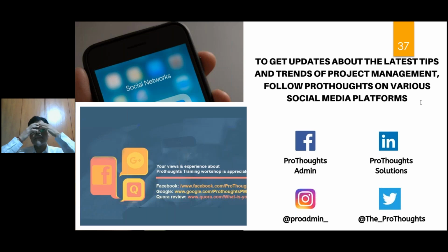And this is exactly where I was mentioning the quantity of those people before you try to acquire the people. Estimation, very, very true. Correct. But based on roles and responsibility and based upon the plan, you decide the quantity and the type of resources. Type you would have done in the plan, but quantity here is where you decide.